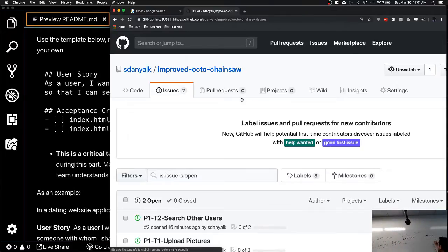You make it production ready. The site is actually live. And you say, okay, this is what I did in 2 weeks. And then you have a meeting at the end of 2 weeks and you show it. You can see what's the advantage. They can actually see if this is the right direction. At this point, they can change and they can say, oh, well, you know what? Now that I look at it, I don't think this is going to work. I had something else in mind. So I'm going to change these boxes. Instead of 3 on the top, I just want 2 on the top.